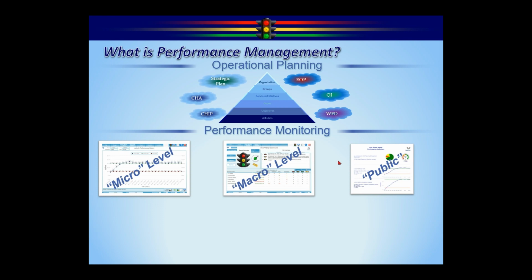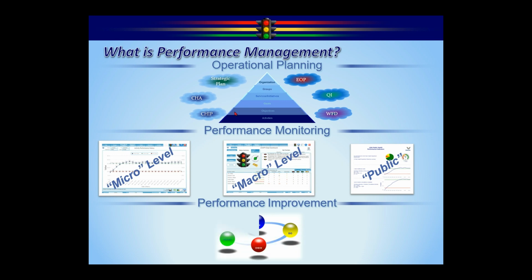The reason the performance monitoring is critical is because, if you recall, every plan is going through this PDCA cycle. So up here is where we're actually doing the planning and then executing the plan. Checking is this monitoring. So we're checking on the status of the plan.